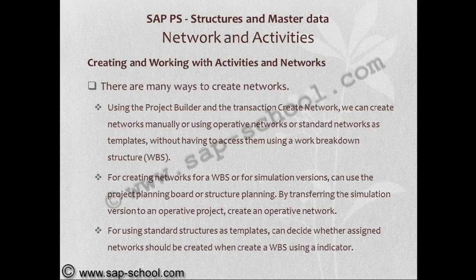For creating networks for a WBS or for simulation versions, we can use the project planning board or structure planning. By transferring the simulation version to an operative project, we create an operative network. For using standard structures as templates, we can decide whether assigned networks should be created when creating the WBS using an indicator.